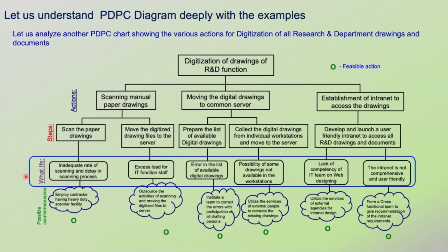So, in the case of potential problems for scanning the paper drawings, what could be the problem? Inadequate rate of scanning and delay in scanning process. So what could be the solution? Employ contractor having heavy duty scanner facility so that we will be able to scan easily.